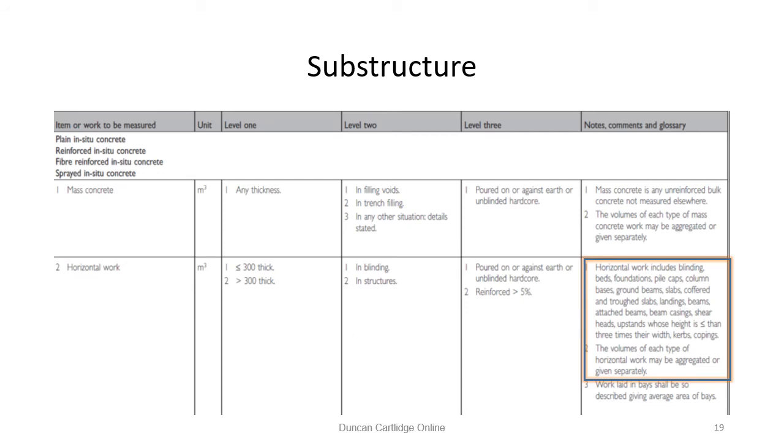Now, turn to page 152 of NRM 2. In-situ concrete is another work section where the taker-off has alternative approaches to describing items. The foundation may be described as horizontal work or foundations. See notes and comments. Again, most people have elected to use both terms as shown on this video on page 20.